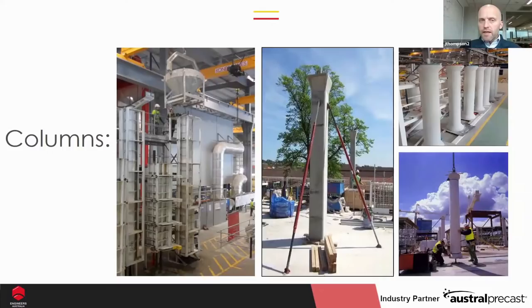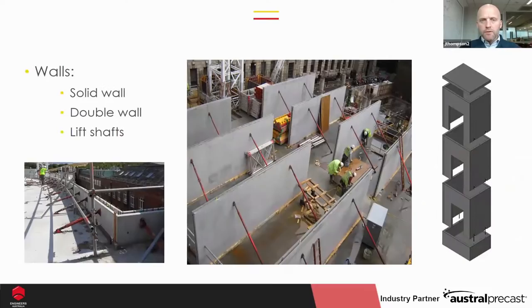Walls. So we're looking at double wall systems there. Just take a pause for a moment and look at that and picture if you're going to do that in situ concrete and how different that scene would look. Every bay would be filled with scaffold, we'd have formwork, we'd have reinforcement on top of the scaffold ready to go into the walls. It just looks completely different. And that's probably 3 or 4 hours work to land all of those walls. So you've got the double wall system with a cavity in the middle, solid wall panels, and anything you do with the wall,